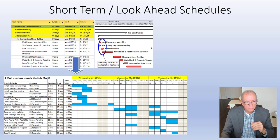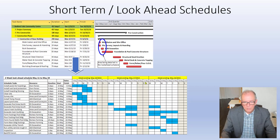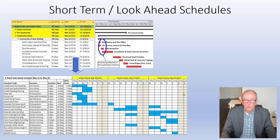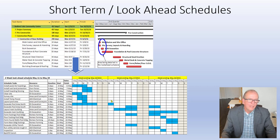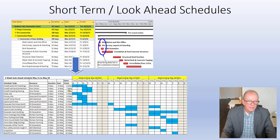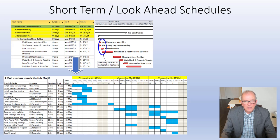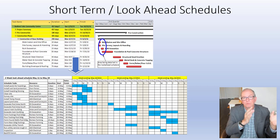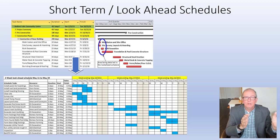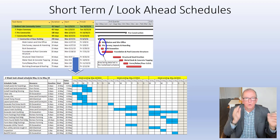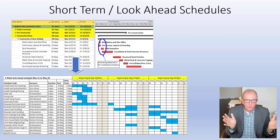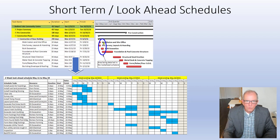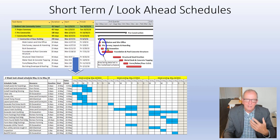Let's assume we've got a two week schedule. Very often people use two weeks, but two week look aheads really require three weeks. What just happened on your project, and then what are you looking at the next two weeks. This is what I really want the emphasis of this video to be: this should not be developed by the site super on the fly without consideration of what the master schedule, the current updated master schedule, says.